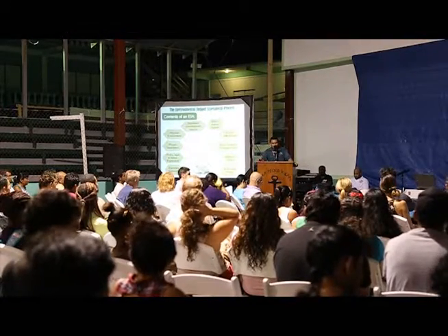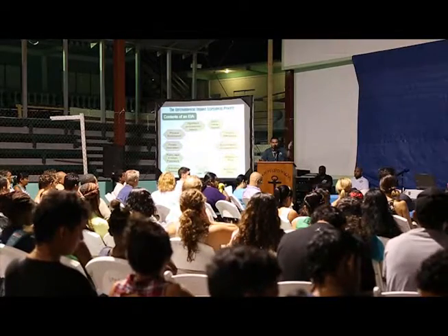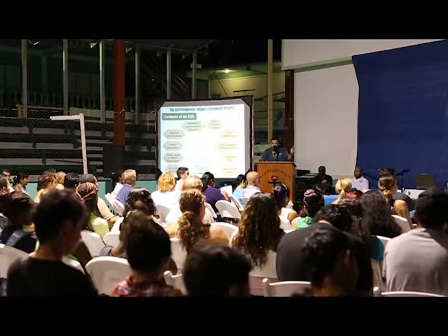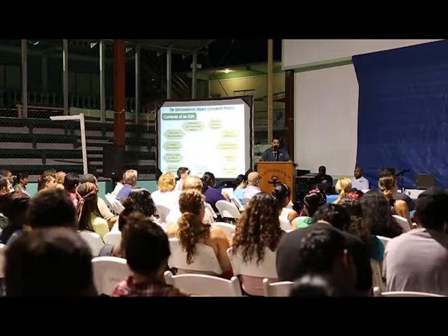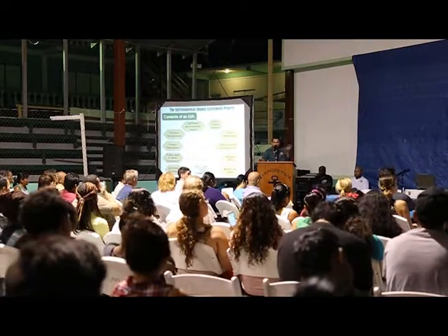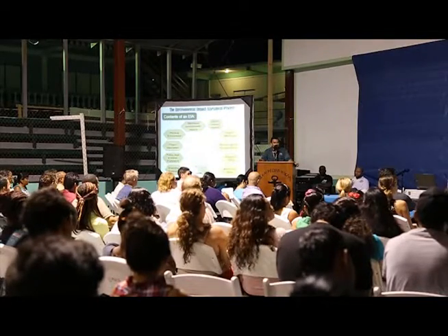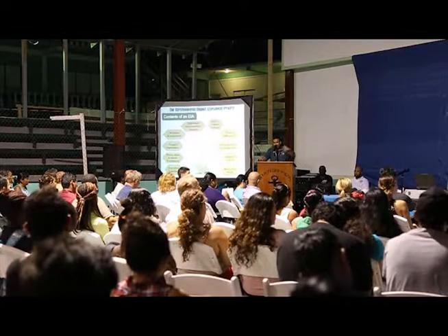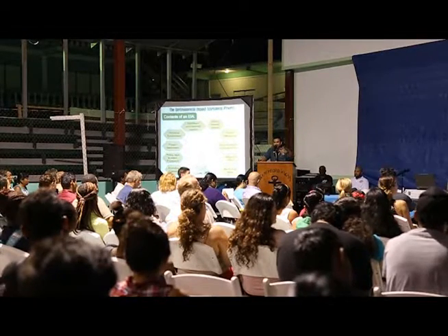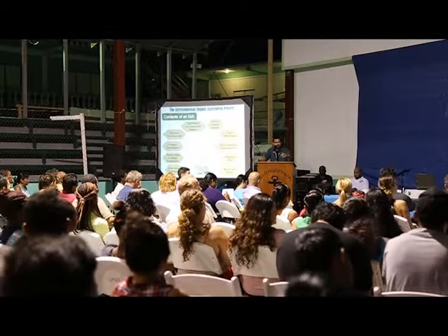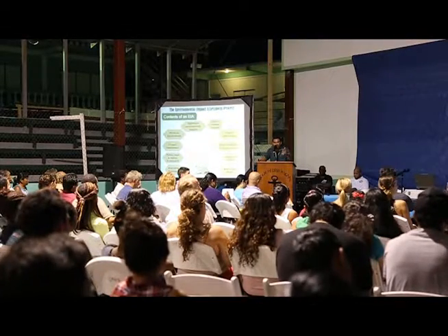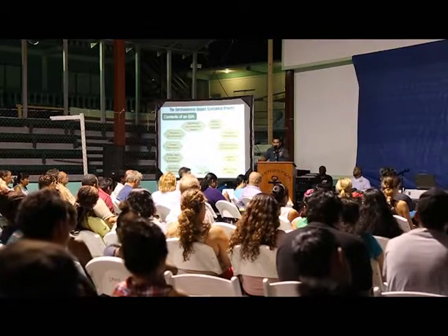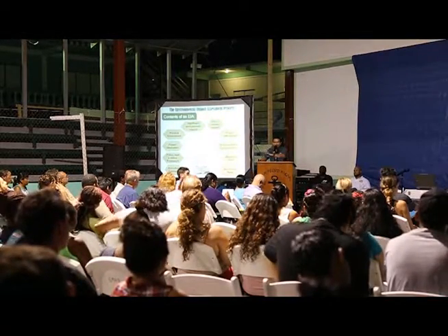It also requires that they have a project description, what they want to do, why they're doing it, and the environment in which they are doing it. The physical environment, they need to provide us a description of where they're putting this project. And like I mentioned, they have to look at the adverse impacts, so they identify the major environmental impacts that were required and identified through the scoping process. They look at what is direct and indirect, and like I mentioned, what are significant, reversible, non-reversible impacts and the mitigation measures.